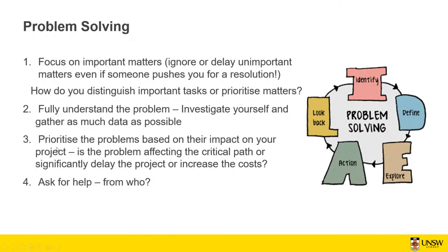Prioritizing is very important as a project manager. You get swamped with a lot of things, so you need to prioritize the problem based on the impact on the project. You need to ask yourself, is this a problem affecting the critical path, or does it significantly delay the project or increase the cost? If yes, then this should have higher priority than the other things.